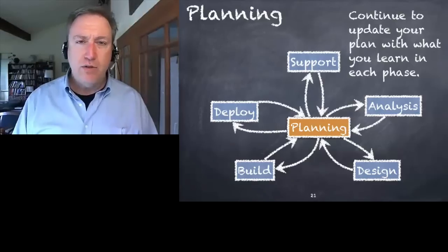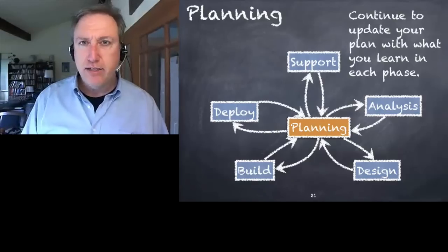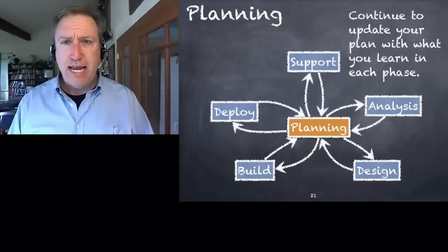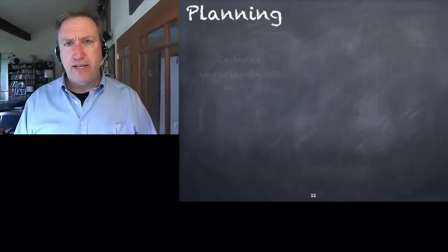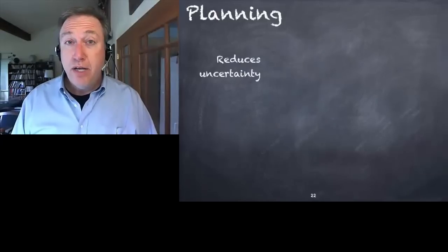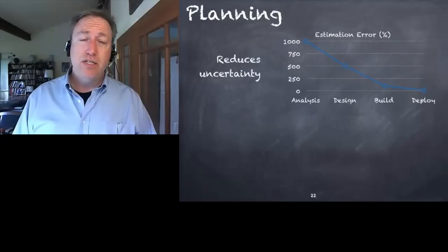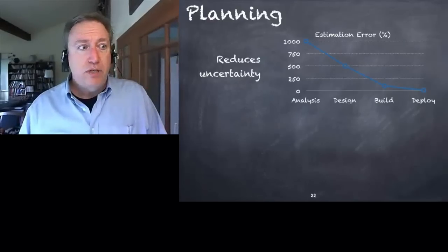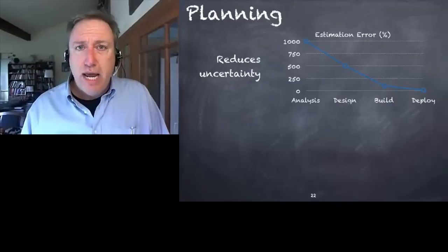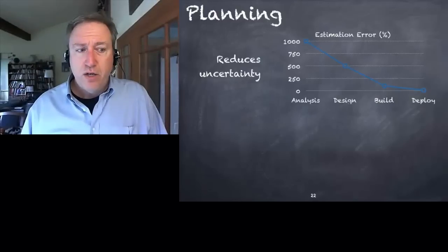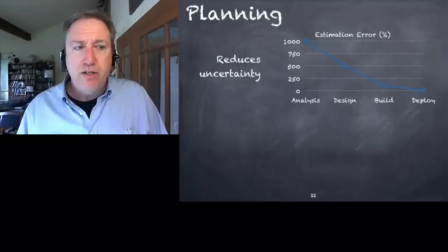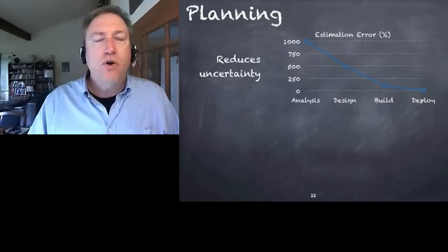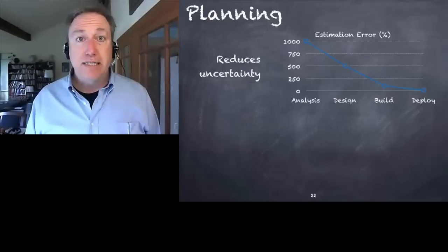Don't wait until you're way down the road before you cancel a project and waste a lot of money and time on it. Planning happens in every phase. Why? Because planning reduces uncertainty. When you start a project, you can estimate all you like, but you don't have a lot of information. You could be off by a factor of 10. Your budgets, your schedules, they could all be so far off that they're just misleading.